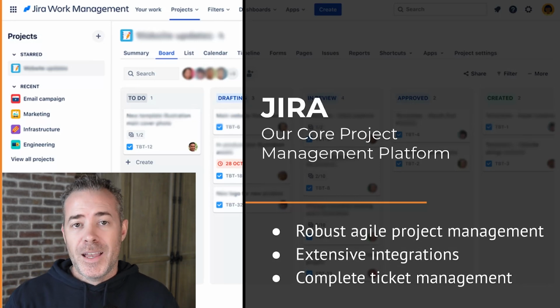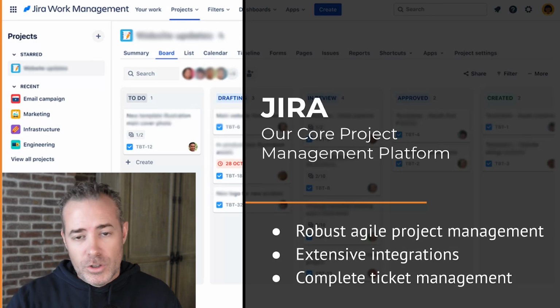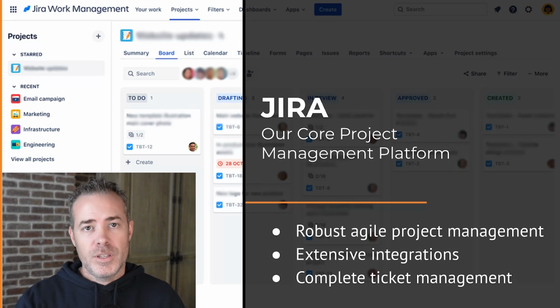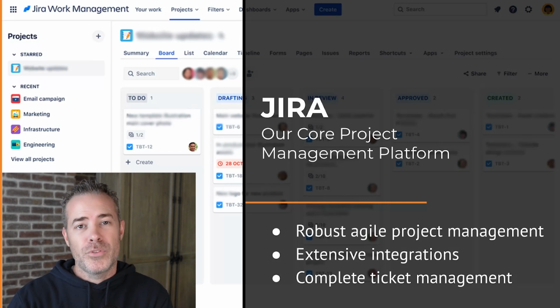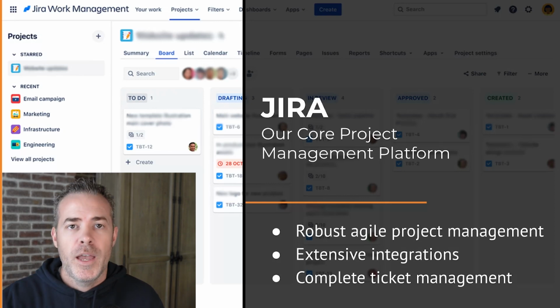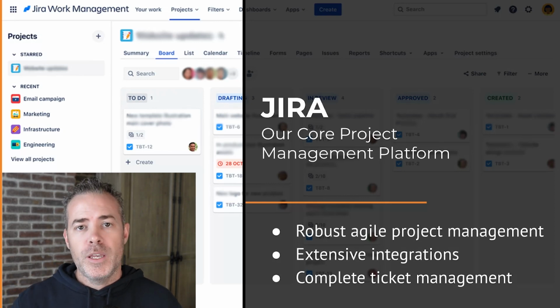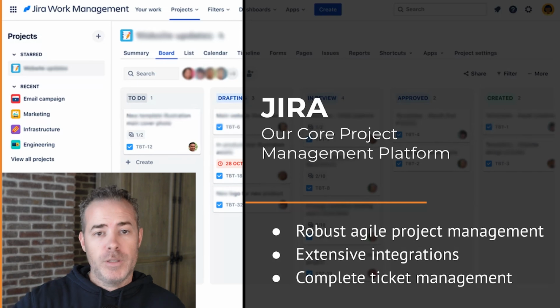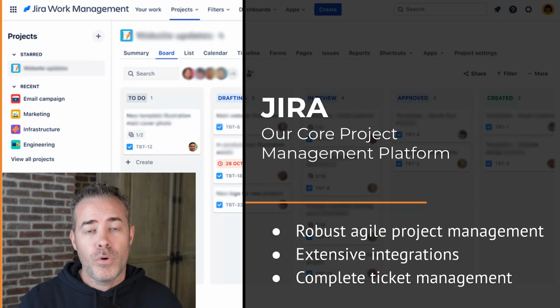Backlog grouping I mentioned, estimation is a big deal there, and you can see that in the view, so you can see the relative size of that ticket in comparison to the other things in the backlog. You can put people's names on it and group things together and start to plan your sprints. So as we're putting things in the backlog and grooming it, we'll start to create sprints within that backlog, start planning those so that we can stay ahead of the developers that are already hopefully in a sprint that's already been properly planned beforehand.